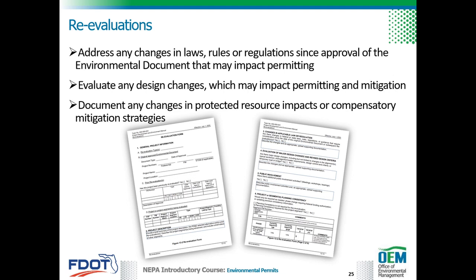The permit coordinator also provides documentation of any agency consultation, such as Section 7 Endangered Species Act documents, a list of permits with issuance and expiration dates, mitigation status, as well as commitment status updates related to natural resources.